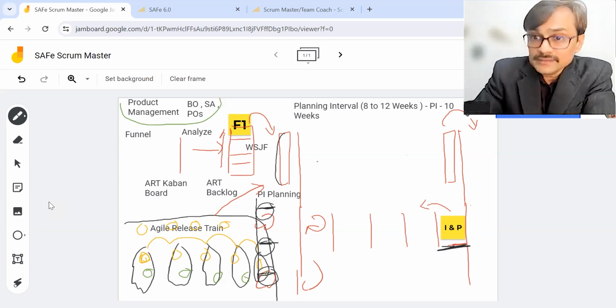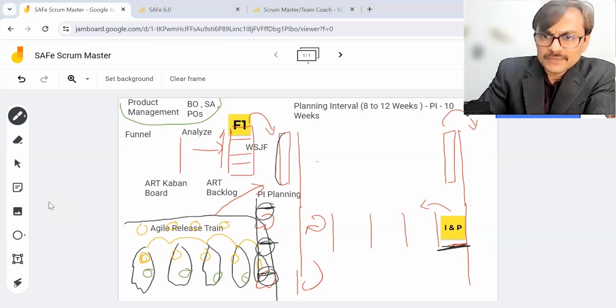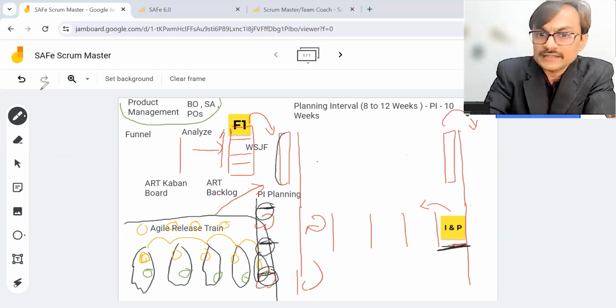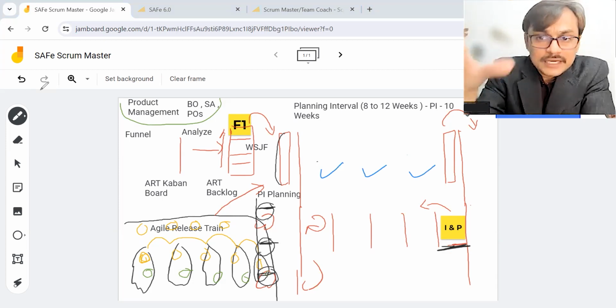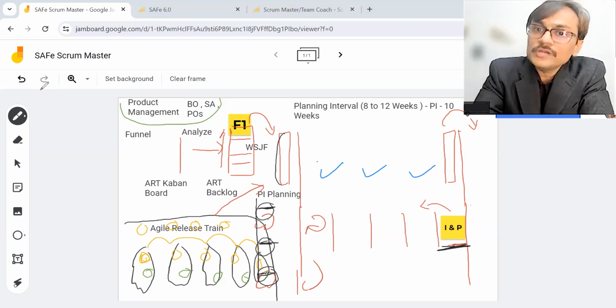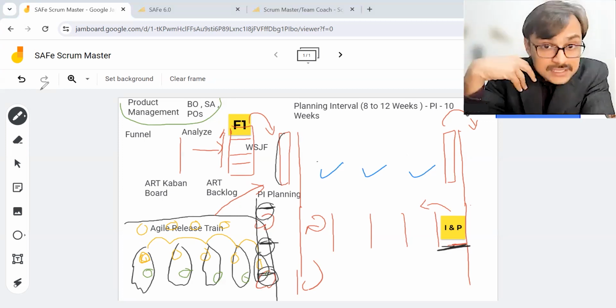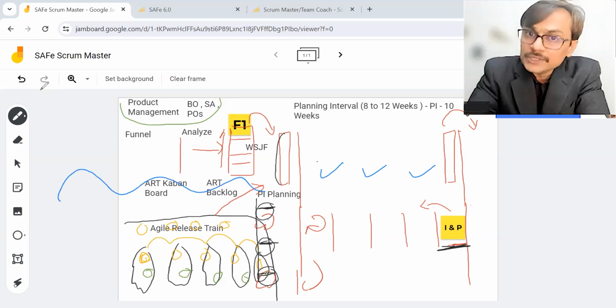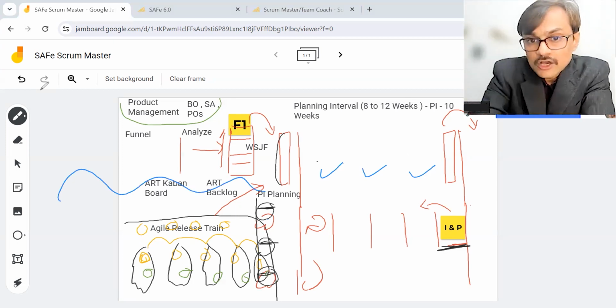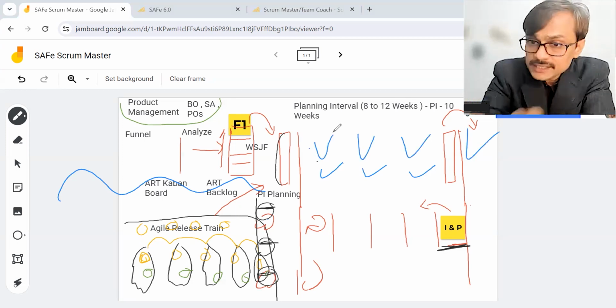Who also is taking leave, probably some mechanism. Now, exactly, we are not saying that you need to collect the leave calendar and all, but some way as a Scrum Master for my team, I should be able to forecast that for the upcoming 4 iterations, this is going to be our capacity. As a Scrum Master, looking at historical data, I should also be able to work with my team to forecast what kind of velocity we can plan for upcoming iterations.